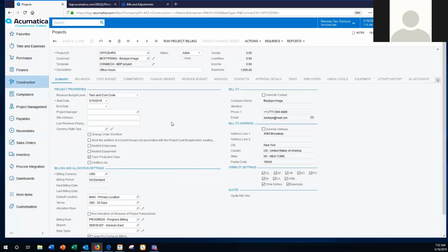If we don't know the last time billing was completed, and we can't show an archive of, how come you were 28% complete last month and now you're telling me you're 18%? If we don't store that information, then they can't hold the feet to the fire with the project management team. So that's why I was asking that question around how we are archiving or keeping up with this information.